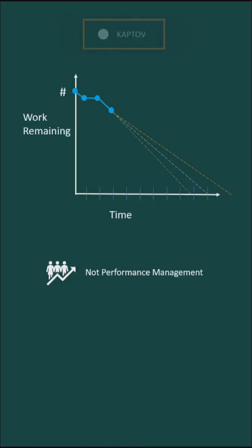And for that, I'd be speaking with the product owner, not the development team. And the development team is creating this, not the product owner. So it's not that. It's also not an evaluation tool. It's not for managers to go and look and say, are these guys working or not? Or, are they planning well? It's not that at all. I see this over and over again, but it's not the intent at all. So nope, not an evaluation tool. You're not going to be able to tell if a team is doing well or not by looking at this report. So stop doing that.